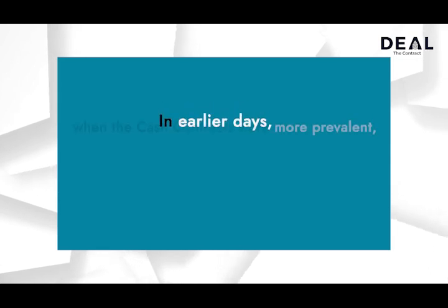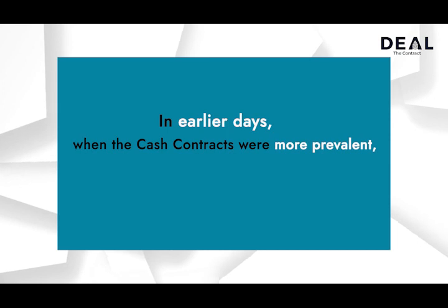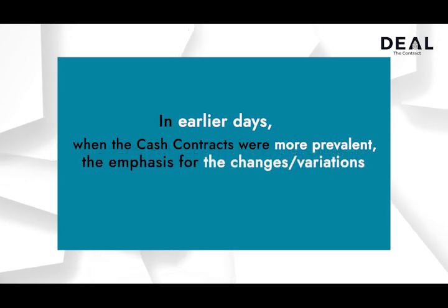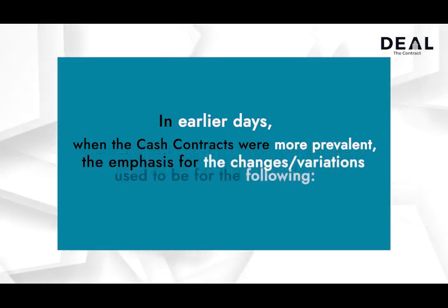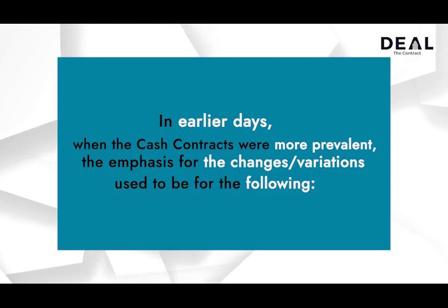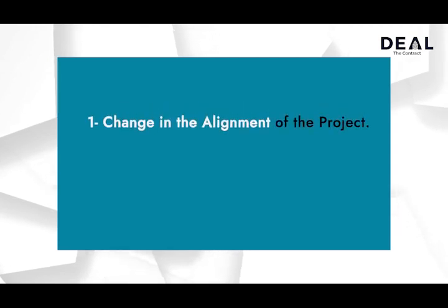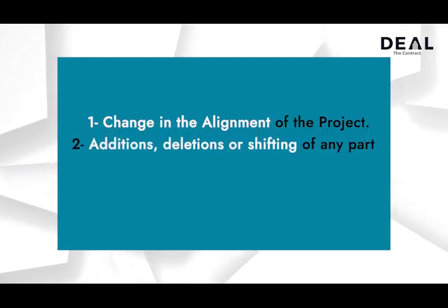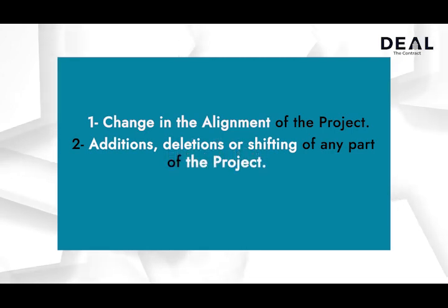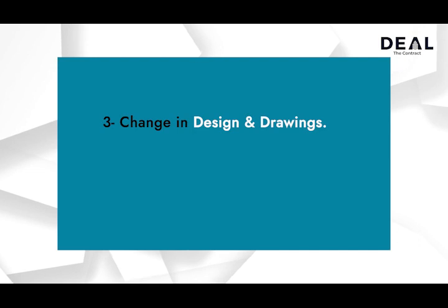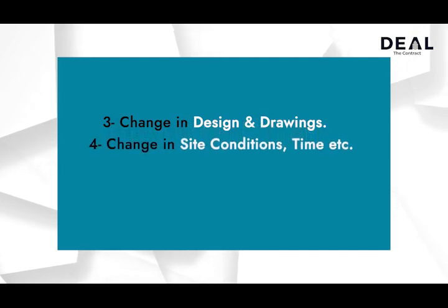In earlier days when cash contracts were more prevalent, the emphasis for changes or variations used to be for the following: 1. Change in the alignment of the project. 2. Additions, deletions or shifting of any part of the project. 3. Change in design and drawings. 4. Change in site conditions, time, etc.